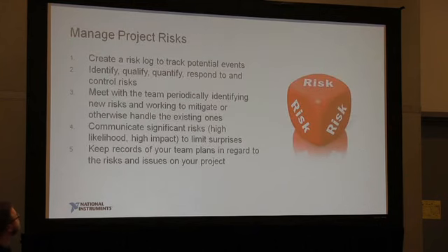So again, we've talked about managing project risks: have a risk log to track potential events, identify, quantify, qualify. We had a project where our test system interacted with a centrifuge that was provided by another vendor. And we were concerned that the centrifuge would not be delivered on time to support our project schedule. So that was a risk that we identified early on, and it came to pass. We did not get the centrifuge on time.